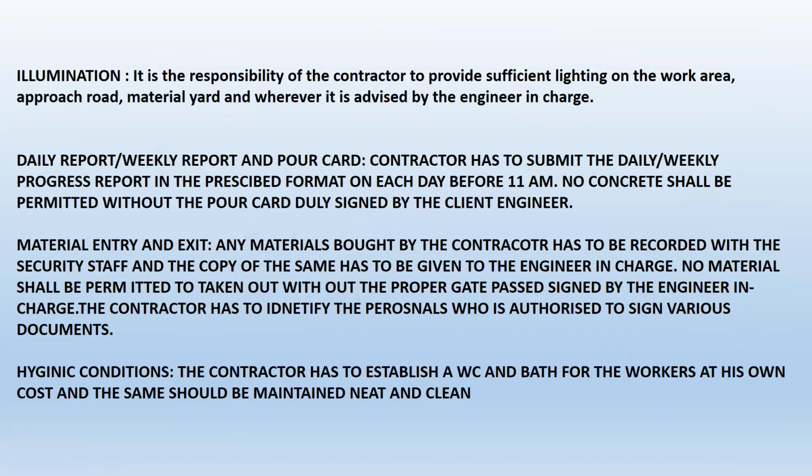Illumination. You have to make sure it has been recorded that all the lighting has to be carried out by the contractor. You also have to identify that the contractor has to submit a daily report on a daily basis. For concreting, if there is an approval of the pour card, it has to be maintained, the pour card has to be signed, etc. Material entry and exit. Who will approve the material exit from the site? All these things have to be clear cut and mentioned in the work order.